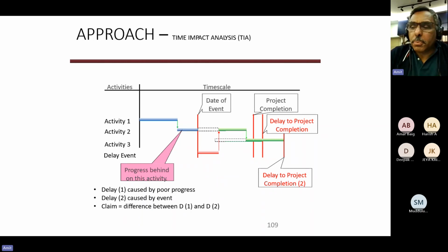How anticipation should be done is generally, a contractor should submit an MS Project or a Primavera schedule to the employer showing the anticipated impact. Thereafter, the PMC, employer and the contractor should sit down together and arrive at a consensus as to what is the likely minimum anticipated impact. In case they can't arrive at a consensus, the decision is left to the PMC and the employer.